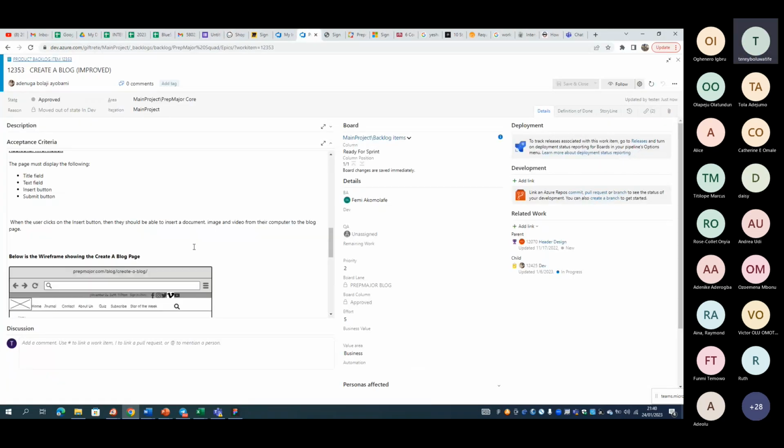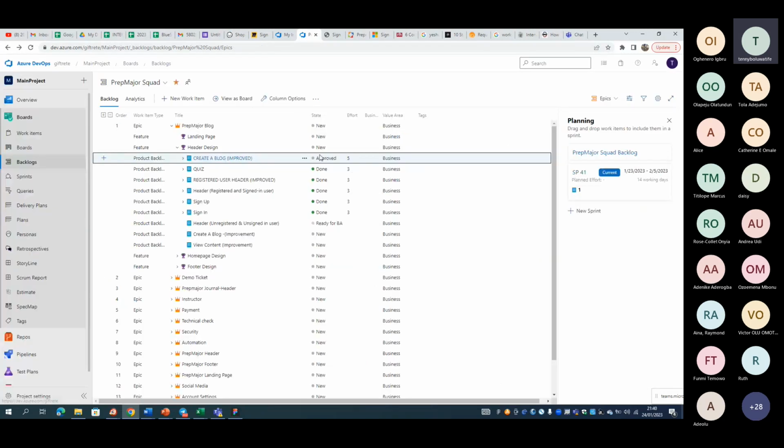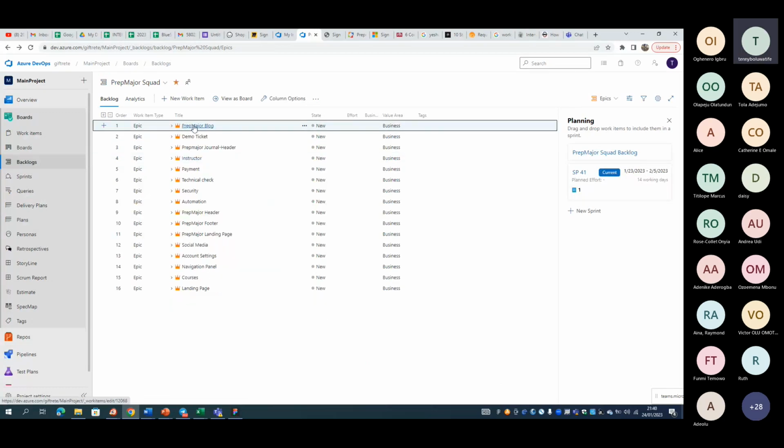Yeah, I get you. So you see that this is a product backlog item. Let me go back and show you. So this is the epic, right? You see this crown. The way I always explain epics, features and PBIs is: epic is the granddad, feature is the dad, and PBI, product backlog item, is the child.